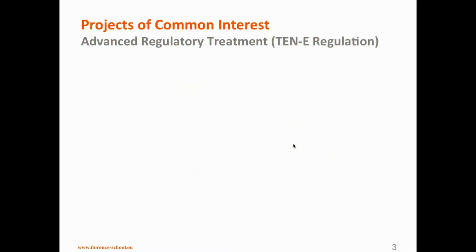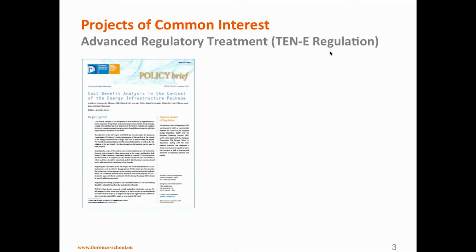Let me tell you a bit more about the treatment of projects of common interest. Well, the TEN-E regulation that was recently adopted foresees that we will have a more advanced regulatory treatment of these projects. Well, first, to become a project of common interest, these projects will have to present a cost-benefit analysis. So identifying all the benefits of investing in that project and, of course, also the costs. We used to do that. Every country had its own rules. But now, for the first time, we will have a European method, a common method used by all projects so that we can compare projects better and prioritize them at European level.